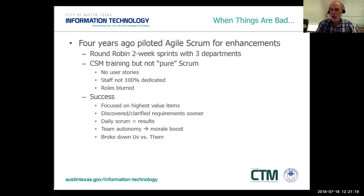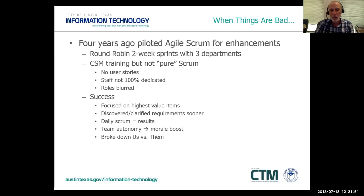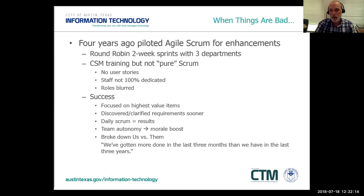After three or four months we did a larger retrospective. Feedback: the team was able to focus on highest-value items and deliver right away. Requirements were discovered and clarified in days rather than a month. Daily scrums put pressure on team members to deliver. Most importantly, people felt autonomy in determining solutions, giving them a huge morale boost. For the first time there was a breakdown of the 'us versus them' mentality — product and technical sides came together as one team.